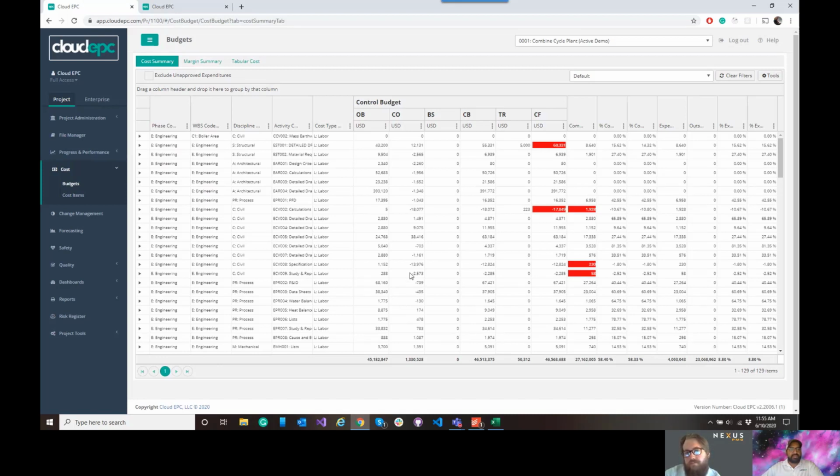It heavily leans on that change management module through workflows and through a baseline-centric mindset of loading that original budget and locking it down. What we really like about the system, not just the reporting capabilities or the pivoting capabilities, is also the level of transparency of what was originally sold by the estimating and sales team, and then every change that occurred to that budget value along the way, whether it was a budget shift, so we moved $5 from account A to account B,